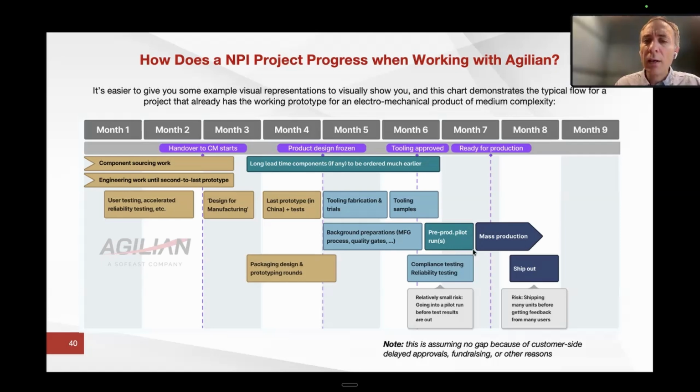And then let's say only one preparation pilot run is sufficient. Everybody's happy. We can go into mass production. So maybe make 50 pieces here, then go into mass production order one, maybe 800, then maybe 2,000, 5,000, 10,000. You can ramp things up, hopefully fast enough for the needs of your business. And then ship out the units as they are ready.